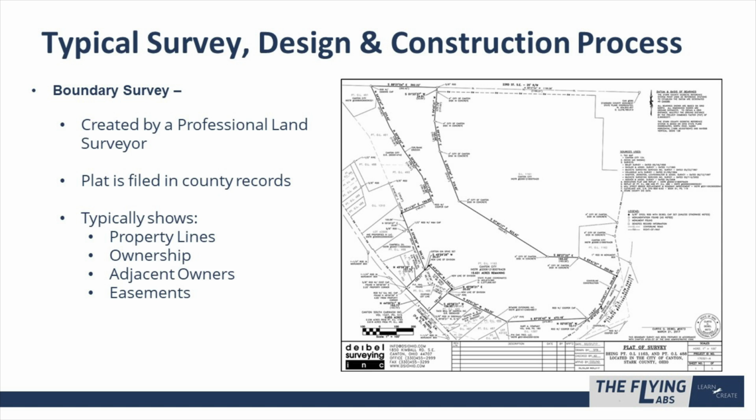So if you were doing a construction in here, in most cases, your limit of disturbance is going to be a certain offset or distance from the property line, based on what requirements the county puts on development of this piece of property.